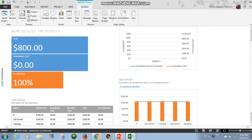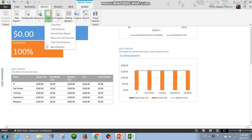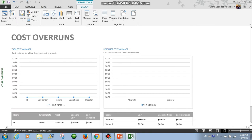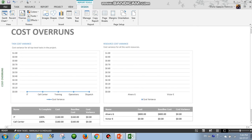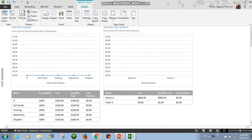The cost of the project will be $800 and the cost of each task is $160, because the rate of Alvaro is $20 and he works 8 hours per day. Here, the cost of the task is the same as the baseline, that is $160. Let's see other reports — let's see cost overruns. Here we will see the variance related to the resources, the cost of the resources. But in this case, we don't have variance, we don't have anything to report here. So let's start introducing some variance.